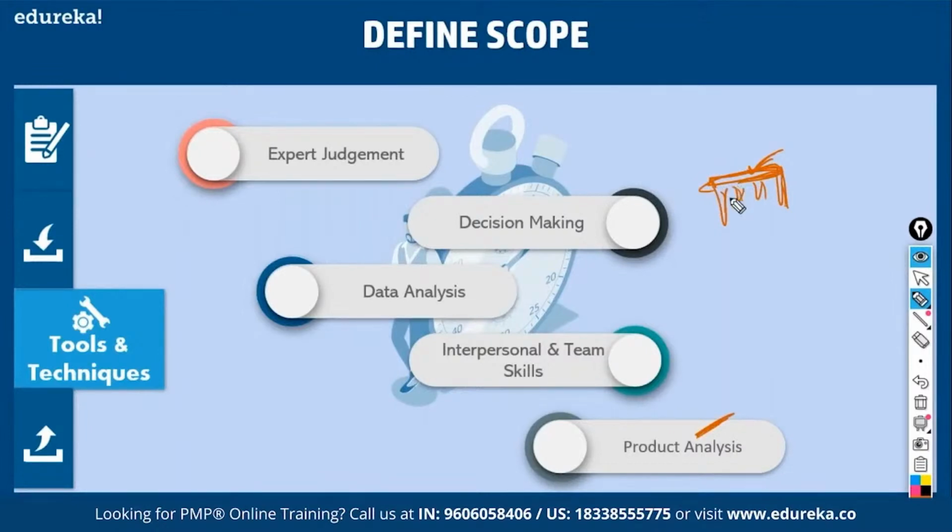So you break down the product into smaller and smaller components, and you understand what value each of these components contributes and at what rate you can buy without compromising on quality. That is, you have to maximize value and minimize cost without compromising on quality. This is what is called product analysis. Some people call it value engineering, systems engineering, or functional analysis. Whatever it is, you have to do all this in order to define a product.